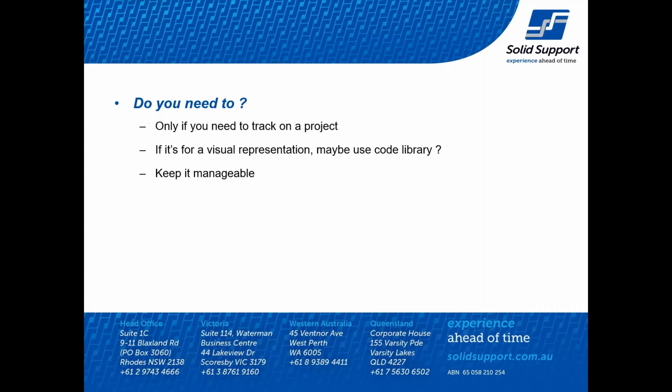When you're setting up a program, the more complex you set it up as, and the more details you put onto it, if you need to track those, yes, that's good. But if it's "I've done it because I can do it," then you could end up in a position where you have too much information to update on a regular basis. So look at how you're going to be updating that. Again, that depends on the type of program and what you're looking to get out of it. And remember, baselining every week will give you that and keep that information as you go.